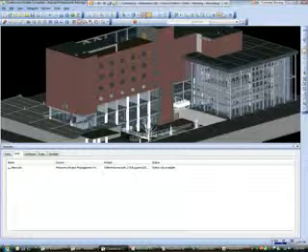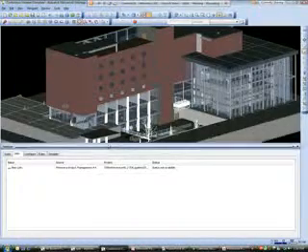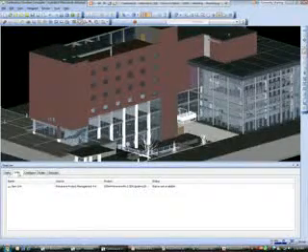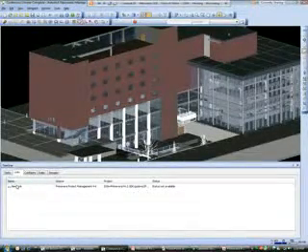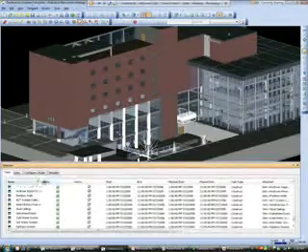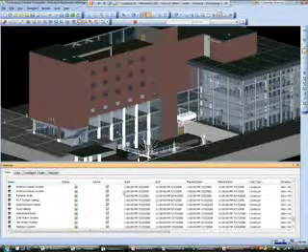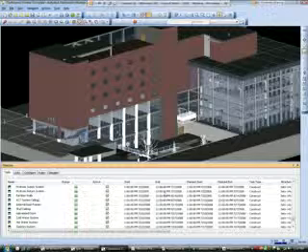And then we have our Gantt chart, which shows us the activities that would be utilized to make this project happen. With Navisworks, I can now take those two concepts, the project schedule and our 3D model, and append them together. And this is where we come up with what's called a 4D model. Inside of the Timeliner feature, I've linked over the schedule. What that's done is brought over my task name, but also the start and end date for those particular tasks.